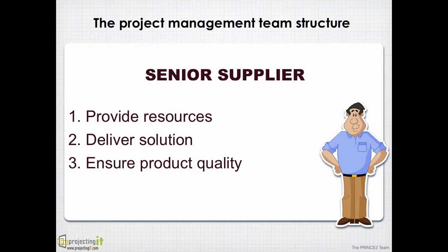Somebody who represents them and ensures that the contract terms are agreed and honored is someone who can become a senior supplier. Apart from that, I will also need developers and testers to build the application. Those who are going to bring me those resources are senior suppliers. For example, an account director for an IT company can become senior supplier. In some cases, when the projects are done for internal customers by internal suppliers, I can have my internal team heads playing the role of senior supplier. They deliver the solution by ensuring that the right quality has been provided and the products are fit for purpose.